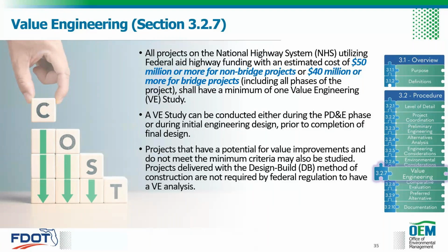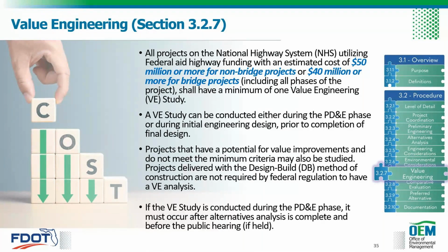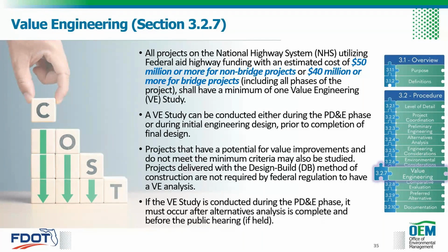And projects that have a potential for value improvements that don't meet the threshold may also be studied with a VE study. Projects delivered with the design build method, however, are not required by federal regulation to have a VE analysis, so you get a little out if you're going design build. If the VE study is conducted during the PD&E phase, it must occur after your alternatives analysis is complete, but before the public hearing.